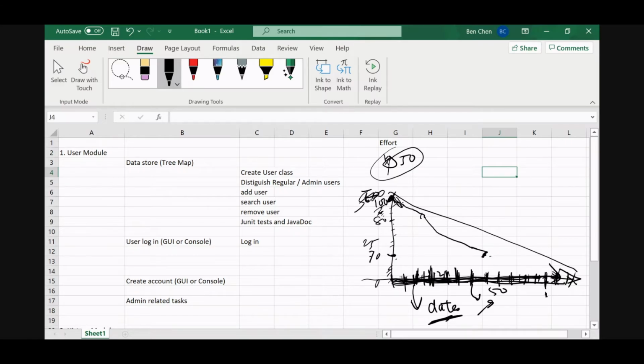Don't give me a percentage, because percentage is only an estimate. Say this is 100%, this is 50%, this is 0%. If you do it this way, it's very hard to use, because you don't know whether it is your estimated percentage or your actual percentage finished. You don't know what it is based on. When you say you finished 50%, did you finish 50% of your estimated amount of work, or does this reflect your actual percentage? You don't know. So just plainly use hours.